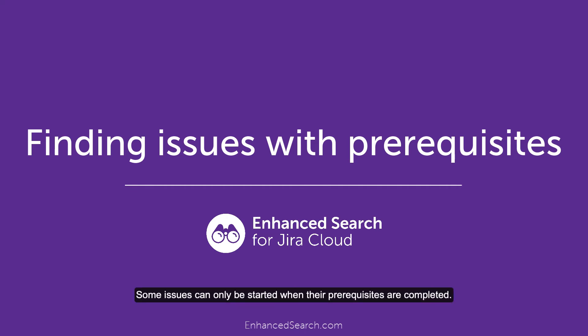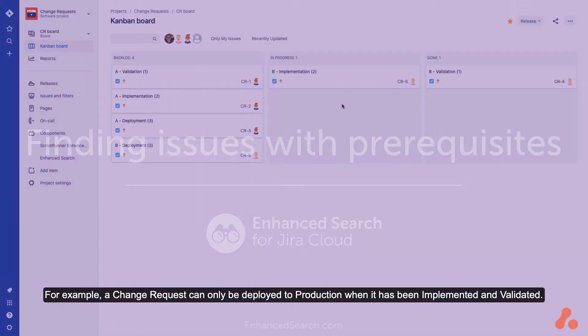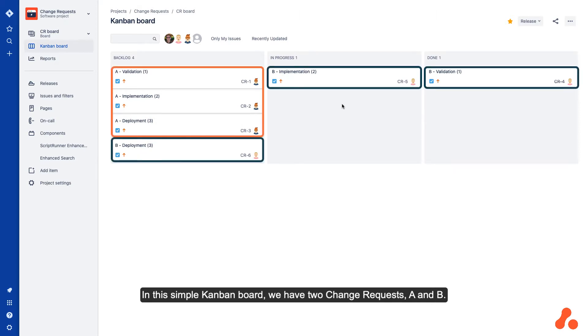Some issues can only be started when their prerequisites are completed. For example, a change request can only be deployed to production when it has been implemented and validated. In this simple Kanban board, we have two change requests, A and B.